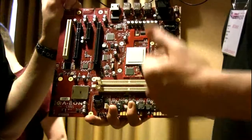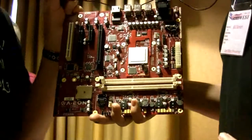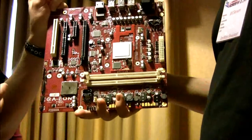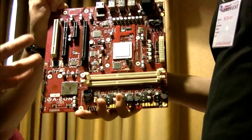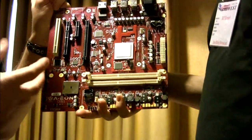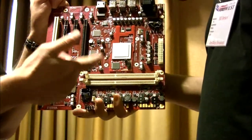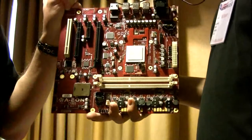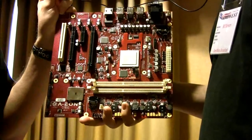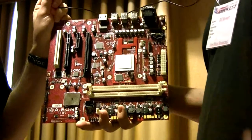So, time frame. Are we going to have these for sale next to Amiwest? Oh, yeah. If we haven't, there's a real problem. How close do you want to get there? Beta test program. The long lead time. We're actually prepaying for all the long lead time items in the build, so CPU 16 weeks on the CPU, you know, 10-year availability, but 16 weeks delivery. And we're getting good pricing from Freescale on the CPU. In fact, we've negotiated good pricing. They gave us 1,000 off pricing. Nice. Which is good. 1,000 off the total order.